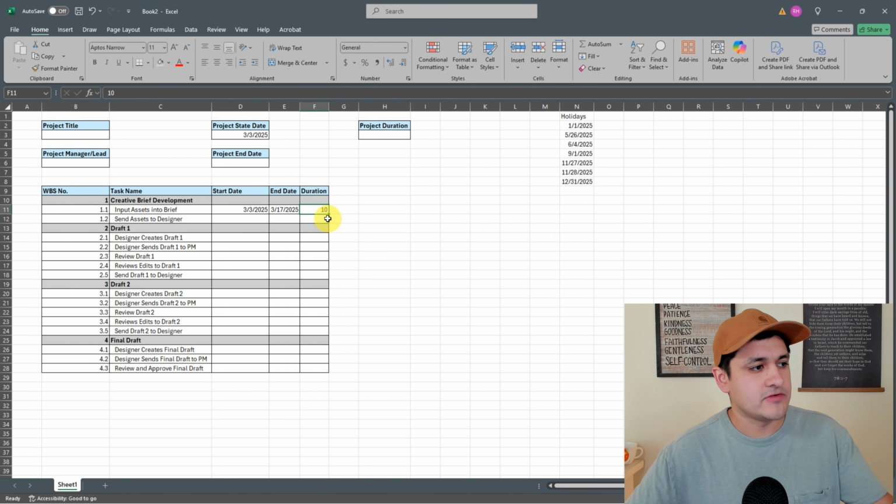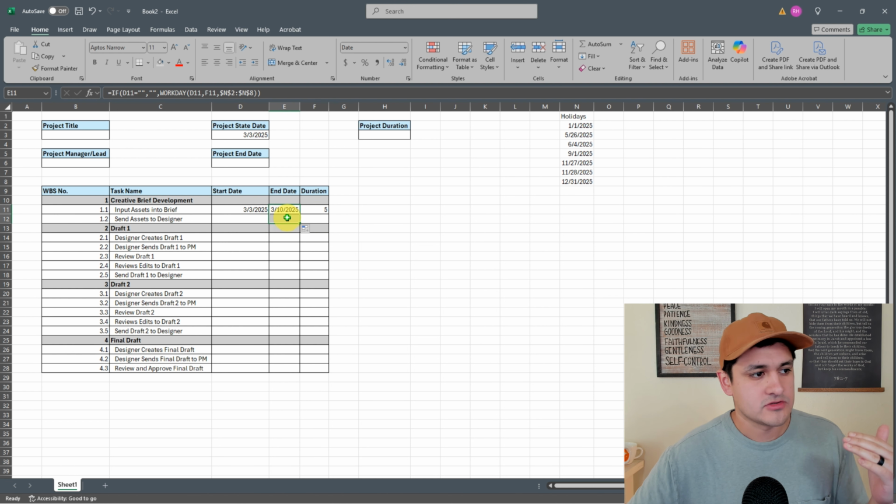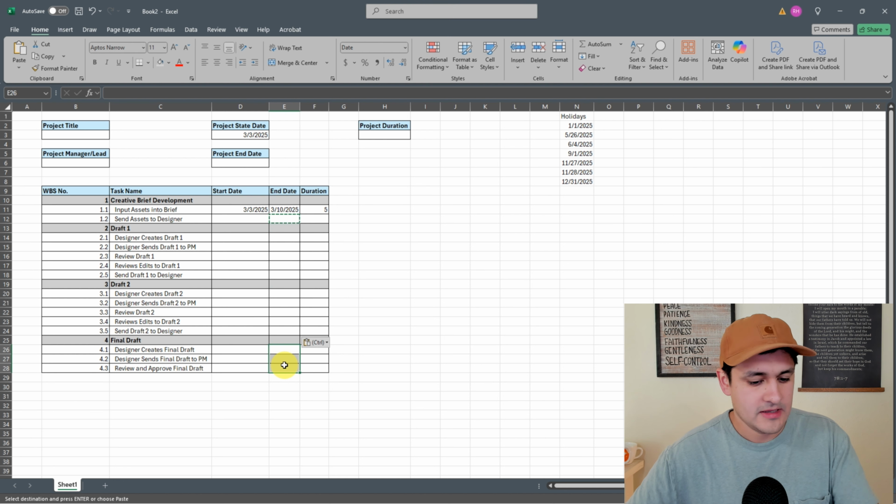And as you can see, I already have a duration of 10 days for this, and it's already included here. Let's say if I do 5, it's gonna update that to 5 days, right? And it's considering weekends. That's what Workday is. It's only counting business days from our start date. So as you can see, I've got my first task in here. So really a lot of this now is gonna be just copying and pasting. So I'm gonna copy this here, paste, copy this here, paste, and paste. So you can see all these I have here, and it's referencing the start date of that task. Now what I'm gonna do here is I actually have to build an if statement formula based off of my end date of my previous task.